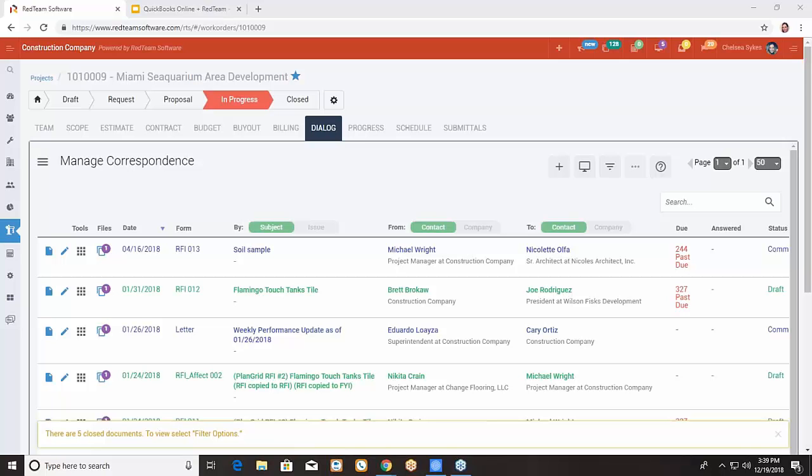We do have a tablet application. Employees can, technically it's not a punch in, punch out, but they can do time in, time out, and then you can just put in an allotted amount of hours. You can also create labor authorizations for them so that they are only putting in hours within a certain cost code or project that you've allotted them in a specific time frame.